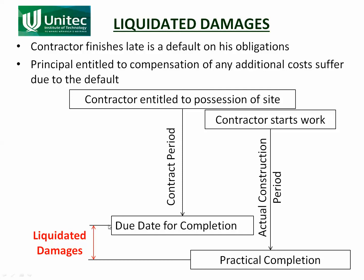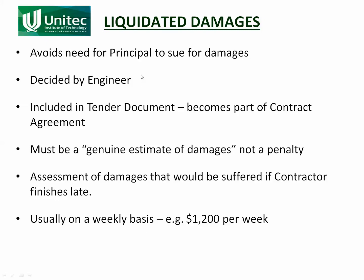The total amount of liquidated damages is the agreed rate multiplied by the time — which is the difference between the due date for completion and when the practical completion certificate was actually issued. Liquidated damages avoids the need for the principal to sue for damages. Those costs — insurances, keeping the engineer on — are what is known as damages. Liquidated damages simply means readily available damages: you don't have to go to court to sue for it. It is a right given to the principal as part of the contract agreement.